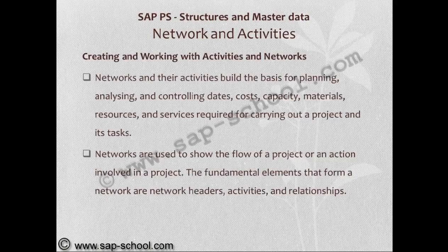Networks and their activities build the basis for planning, analyzing, and control dates, costs, capacity, materials, resources, and service required for carrying out a project and its tasks. Networks are used to show the flow of a project or an action involved in a project. The fundamental elements that form a network are network headers, activities, and relationships.